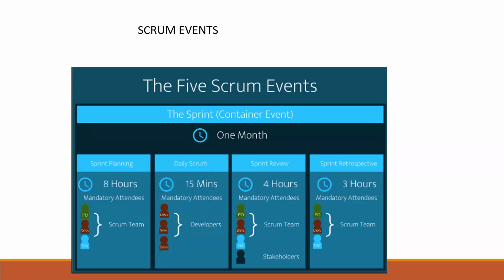Next, sprint review. The sprint review is something where you will show what you have done. The developers are going to showcase what they have worked on as per the customer's requirement, and they will show it on that day. A day before the end of the sprint.